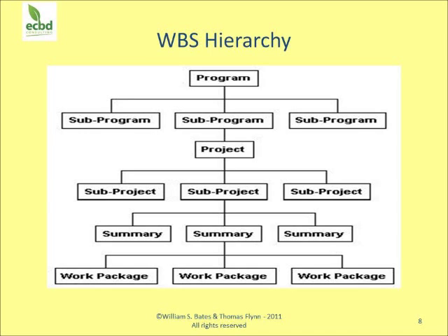And the larger the project and the program, the less the sequence thing is of concern. What we're going to do is take and identify each of the major products and then break them into subtrees of subproduct components. So what we're going to be doing as we do that is follow the product development. The lowest level of the subtrees, the WBS subtrees, will be called work packages.